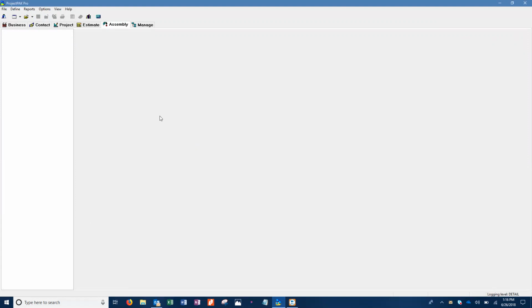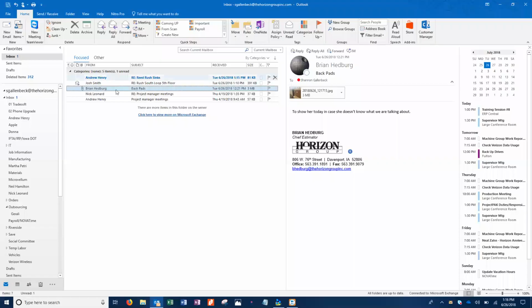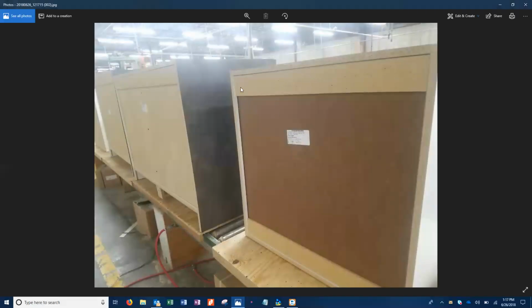Okay, let's see, the next thing is, in our cabinet construction, we use back pads. Are you familiar with what those are? Do not know what that is. Okay, because again, I showed my quote to our materials guy. He's like, "Oh yeah, everything's real good. Where's the back pad material?" which we just buy in sheets, and since we do our 3/8 back, we add this as, I guess, security or added for installation. Each wall cabinet gets 2 back pads, and the base gets 1 back pad.